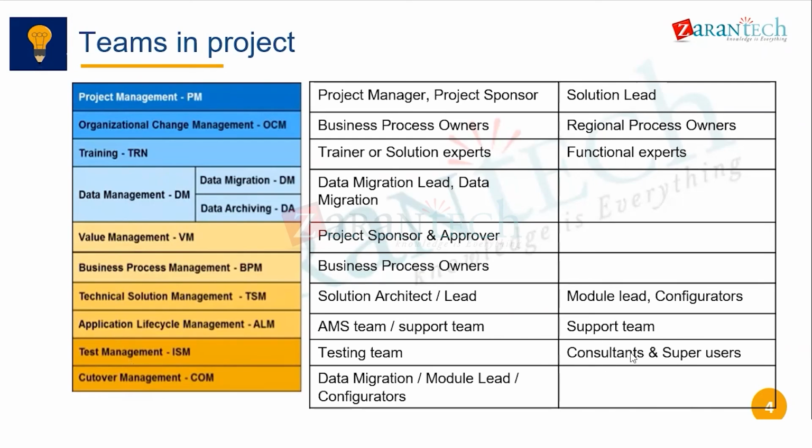Here also, sometimes you need to work with the super users to prepare the test plan, right? Training and test management are kind of coexisting. Sometimes the super users prepare the training document, or sometimes the consultants work with the super users to prepare the training document. And cutover management, as we have discussed, is at the final preparation stage where you list out the configuration checks, the manual configuration activities, and the data loads which need to be done in the system. All those things are checked at this point.